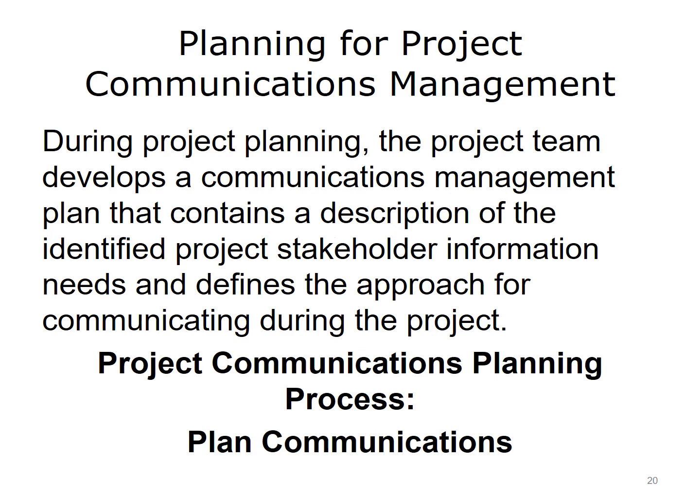During project planning, the project team develops a communications management plan that describes the identified project stakeholder information needs and defines the approach for communicating during the project. A communication requirements analysis is performed to determine the stakeholder information needs. The project team must determine what project information will be shared, who it will be shared with, when the information will be shared, and how the information will be shared.